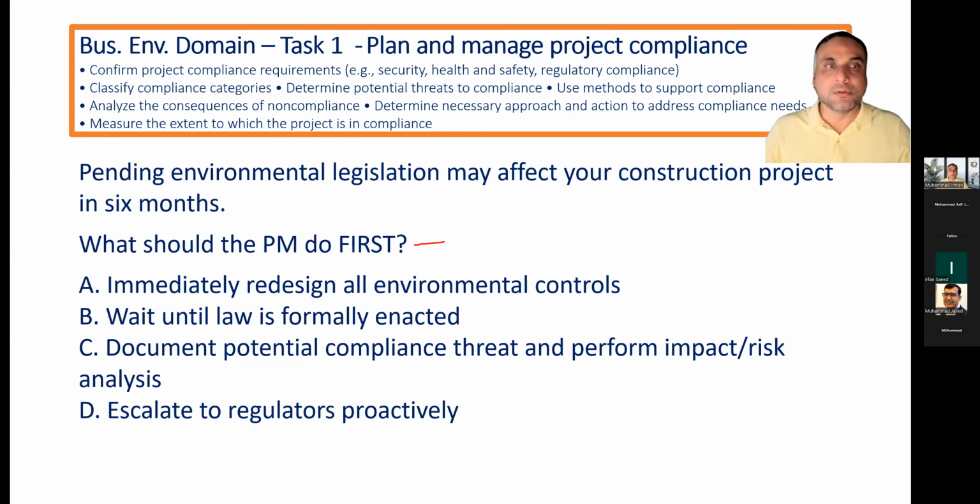First, immediately redesign all environmental controls. Wait until law is formally enacted. Document potential compliance threats and perform impact analysis. Escalate to regulators proactively. So, when you see the risk, we have defined